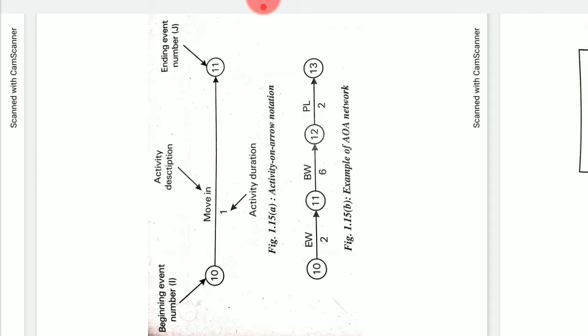There is, however, a need for providing dummy activities when the project contains a group of two or more activities that have some but not all of their immediate predecessors in common. Also, if an activity has more than one predecessor and one or more of these predecessors is also a predecessor for some other activity or activities, then dummy activities are generally required to make the connections.